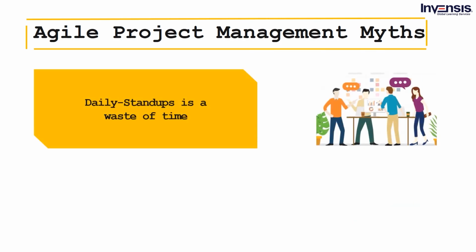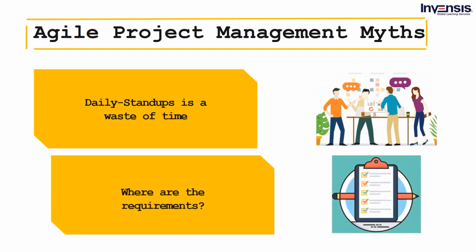Myths about daily stand-ups. The myths about daily stand-ups basically question its credibility. First of all, the short time frame within which a stand-up meeting functions makes sure three things primarily. What has been completed? What will be completed? And any significant shortcomings or roadblocks. To think that the stand-up meetings solve the project-related problems is childish, and discrediting its efficiency based on the myths is irrelevant.